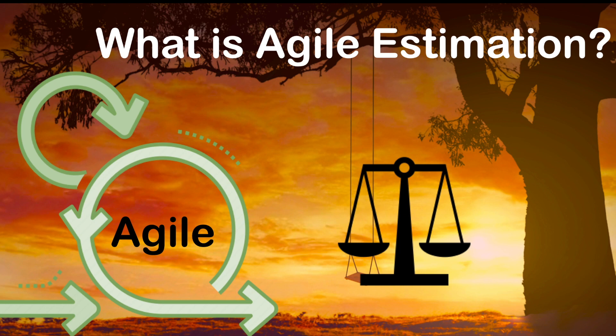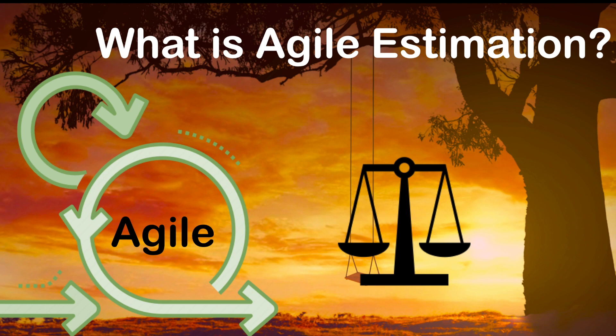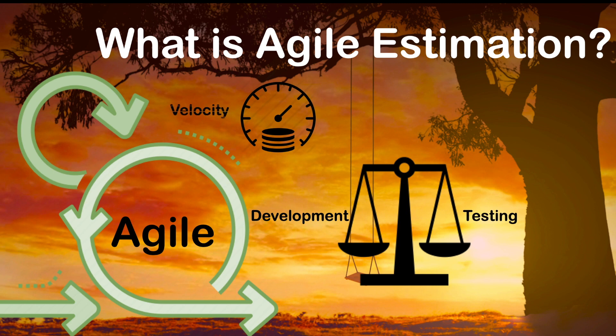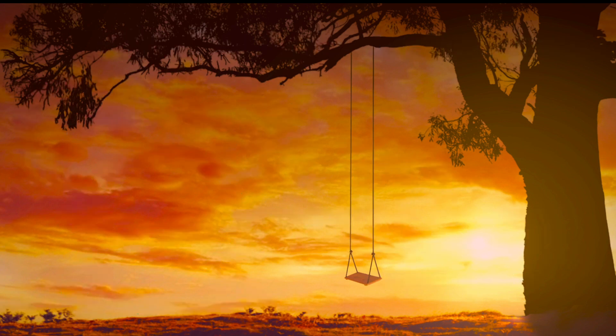From my experience, as I worked in multiple Agile teams, most of the teams use story point as a unit to score their task. For example, after 2 or 3 sprints, they will come to know the velocity of the sprint team. Usually it will be like 60 to 80 points.